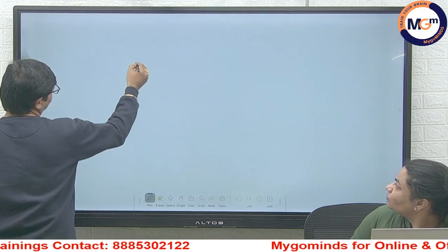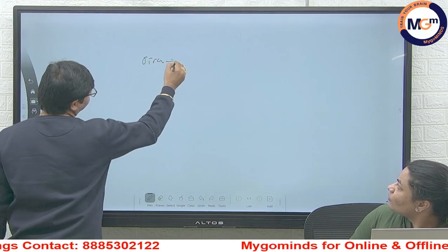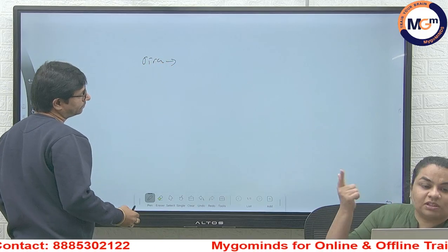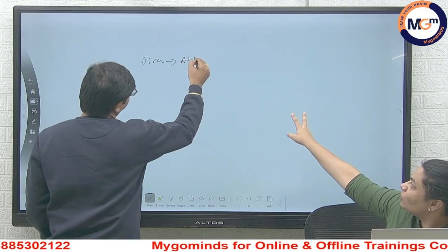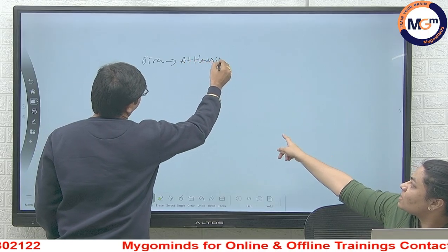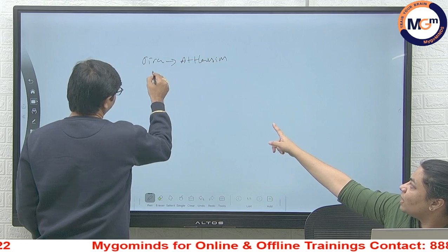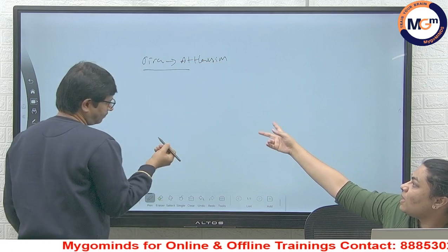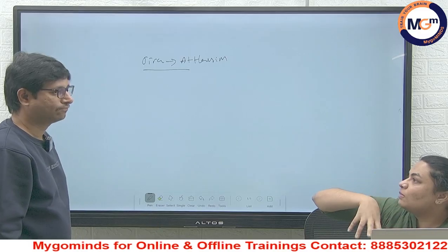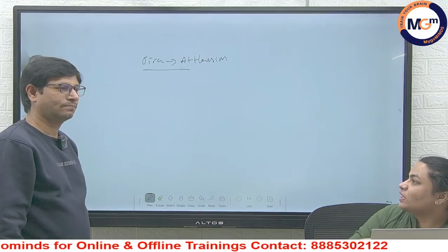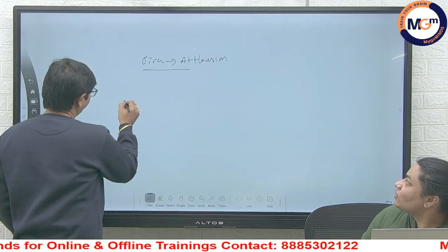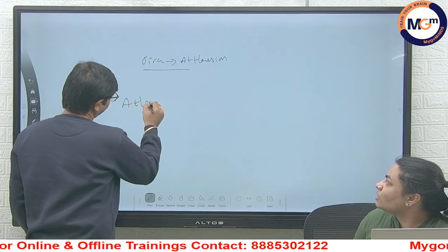Yes, right. So who created that Jira, ma'am? Usually user stories will be defined by product owners. Then comes the Scrum Master, who will create this entire Jira board. The project manager or Scrum Master will handle the Jira board, workflows, dashboards, triggers and everything. Any transition rules will also be handled by the Scrum Master and project manager.